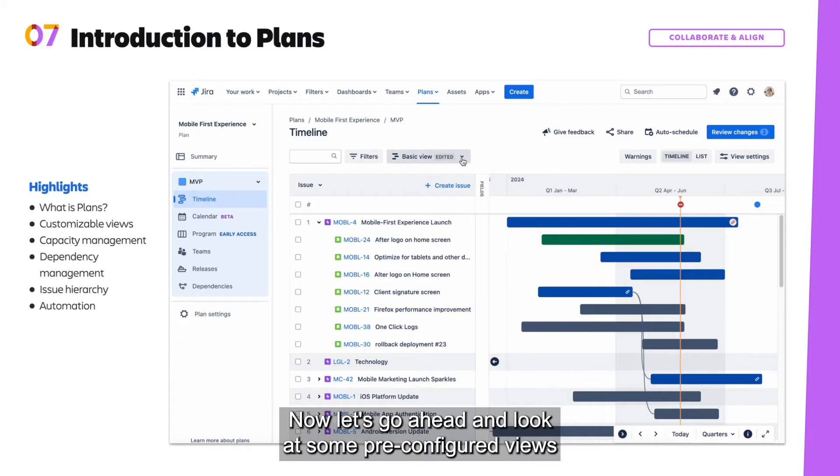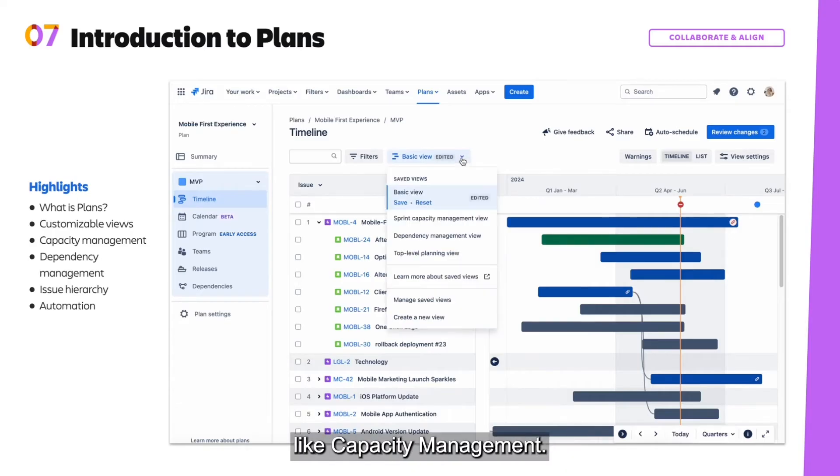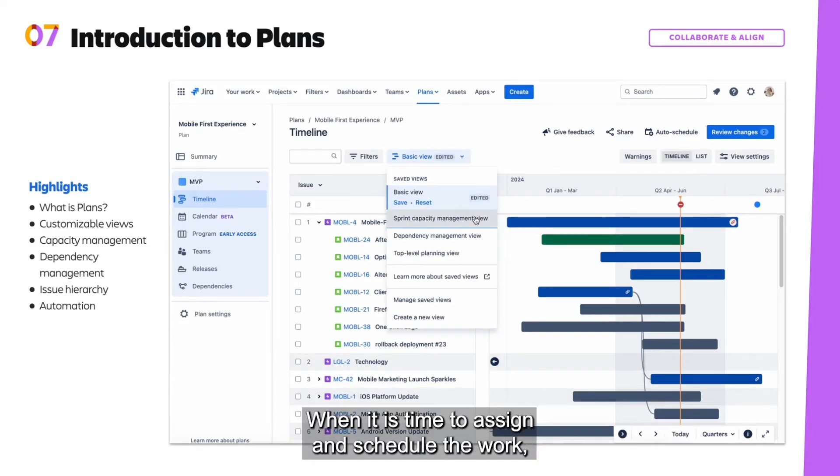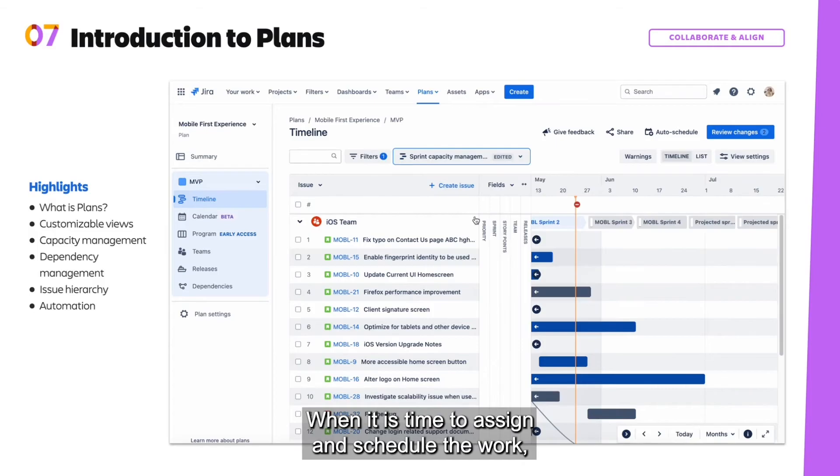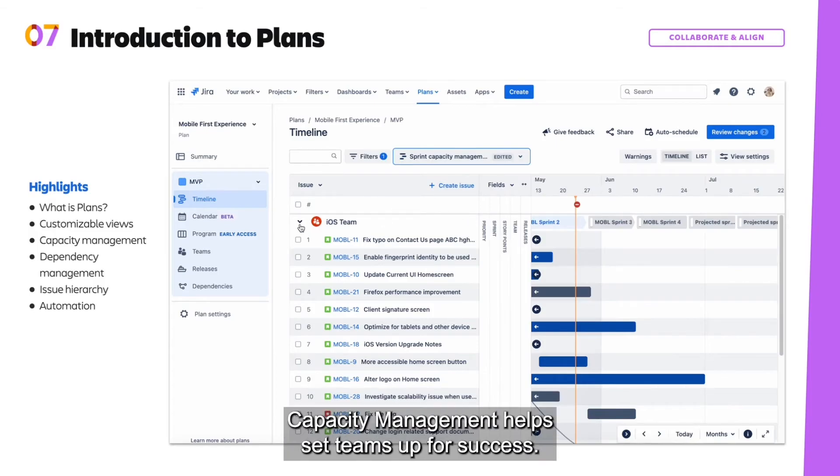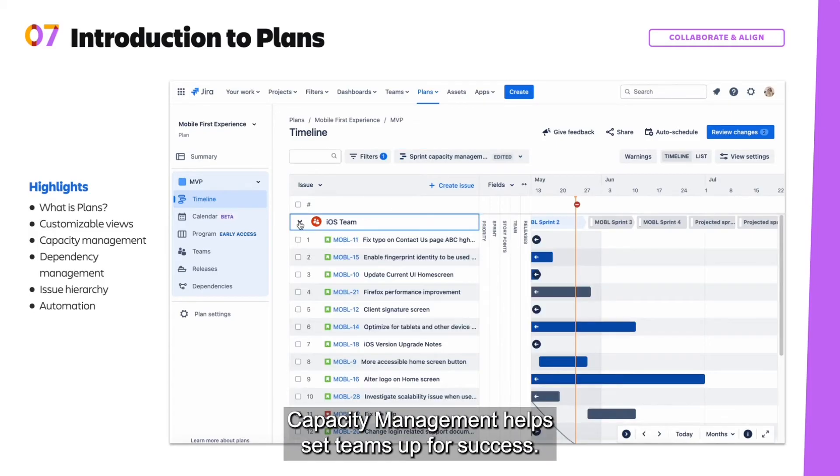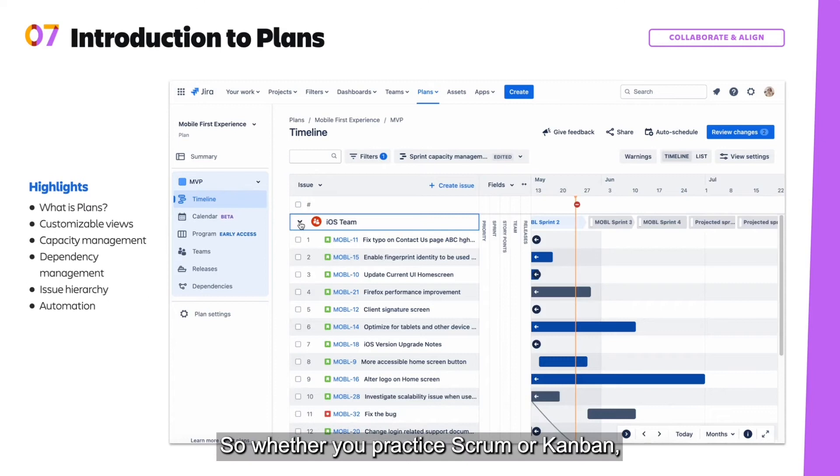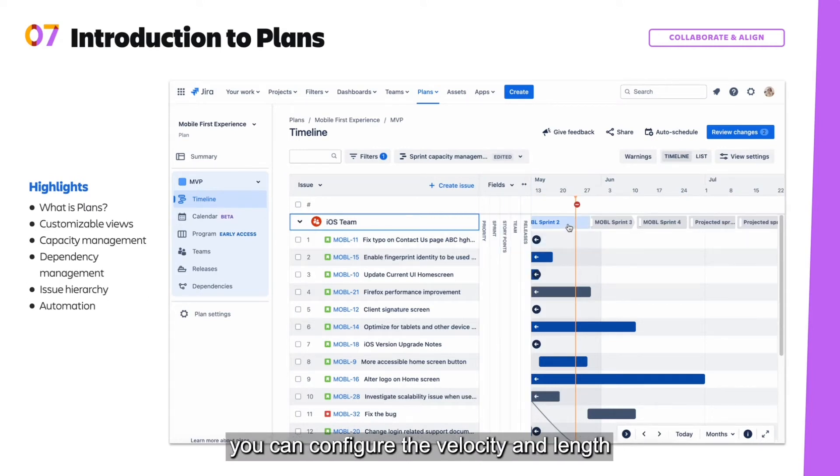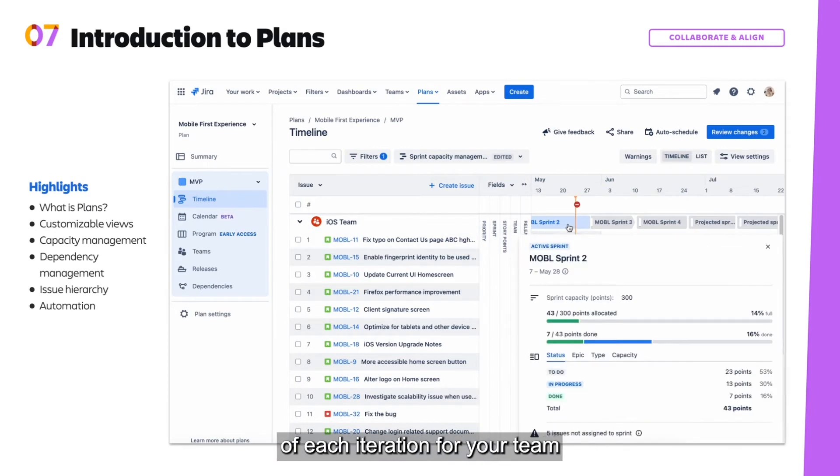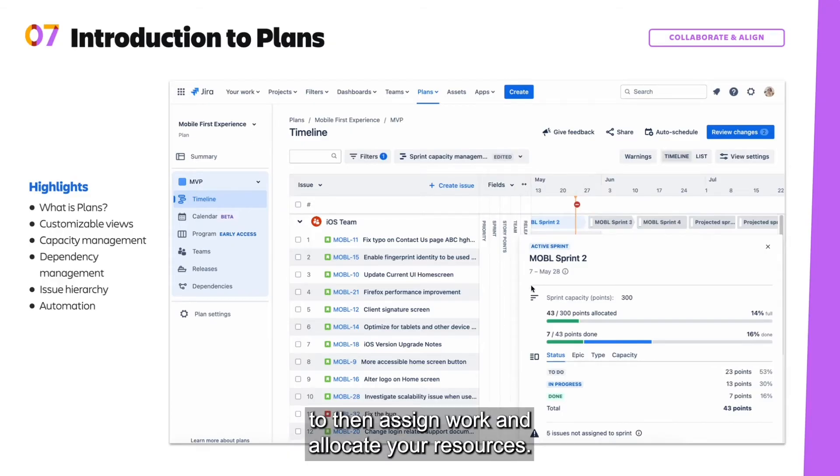Now let's go ahead and look at some pre-configured views like capacity management. When it is time to assign and schedule the work, capacity management helps set teams up for success. So whether you practice Scrum or Kanban, you can configure the velocity and length of each iteration for your team to then assign work and allocate your resources.